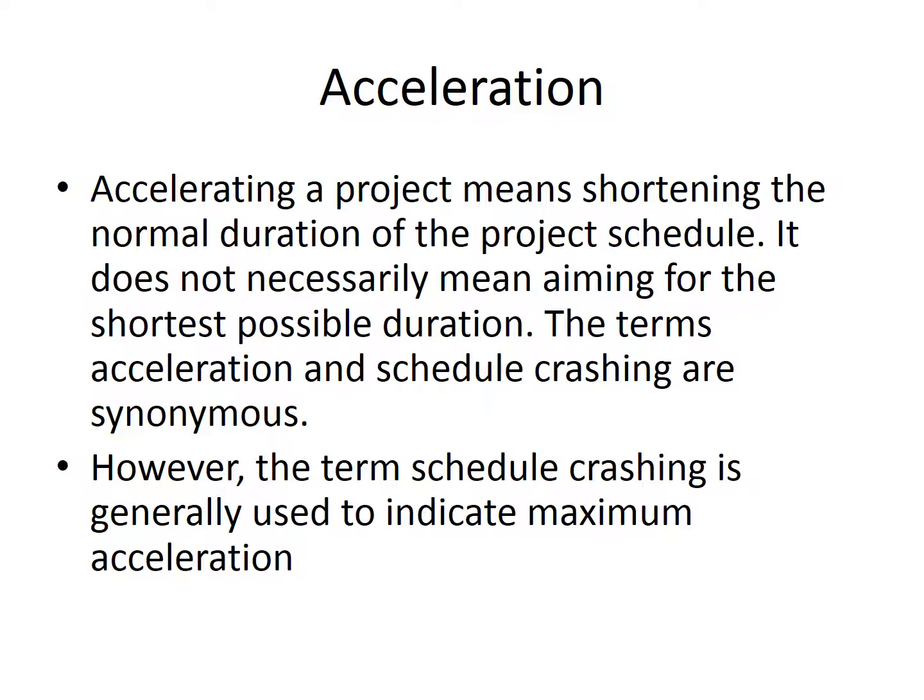And as soon as I start talking about acceleration, we might be talking about increasing the crew size. We might also be talking about an increased amount of overtime hours. So you go to a subcontractor and say, we're behind schedule, we need to accelerate. Don't expect that to be the easiest conversation you ever had. You might have something built into the contract that allows you to accelerate within a reasonable amount of time, but again, speeding up or slowing down has definite financial implications.